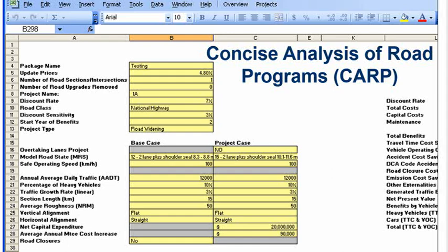Some parts of the Bruce Highway don't have the vehicle numbers to produce high enough benefits to cover the costs. In some of the flooding areas, the closures weren't long enough. Those sorts of things could be picked up very quickly using this model, and it would give us a good idea. Whereas if we used the detailed model, this program would probably run for several years instead of just a few months. Once that's been done, we can revisit the projects in more detail later on and eliminate the ones that weren't going to perform particularly well or shouldn't be considered priorities.